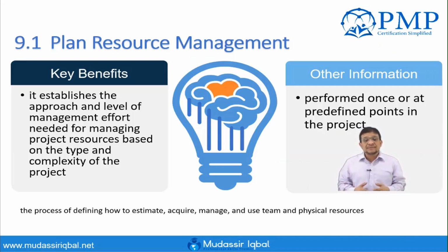The resource management plan contains the resource management processes and associated tools and techniques. It's a component of the project management plan and guides how resources should be categorized. We need to identify human and physical resources, in terms of equipment and material, and then allocate them properly in the categorized way that we have created, and then we have to release them.